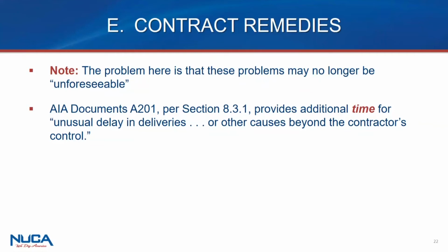What's interesting, and while I haven't seen it raised yet, your right to extra time typically revolves around the notion that the issue that's arisen was unforeseeable. Just as an FYI, you might run into a situation, like I've seen happen with COVID, where since everybody knows about it right now, it cannot be treated as a basis for additional time because it's no longer unforeseeable. Just be aware that the owner might raise that as a defense. Unless you put it specifically in your contract, which would be great.